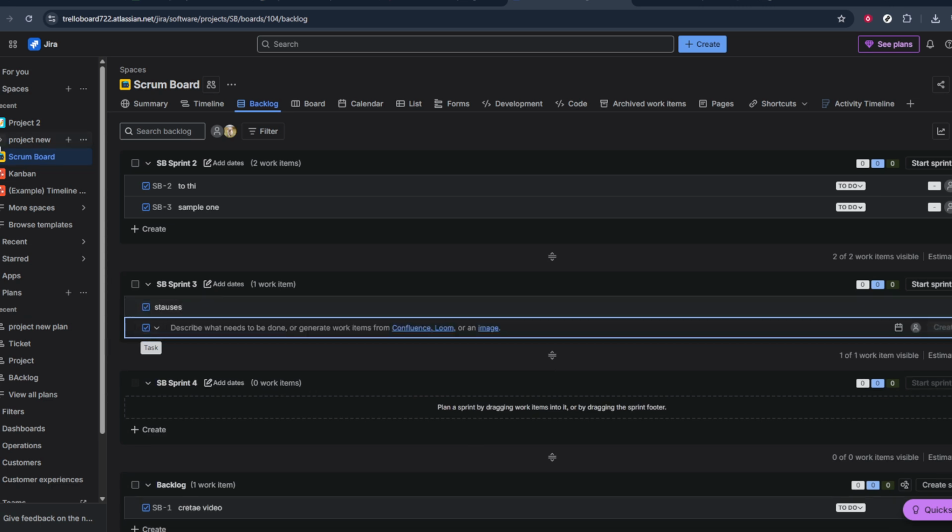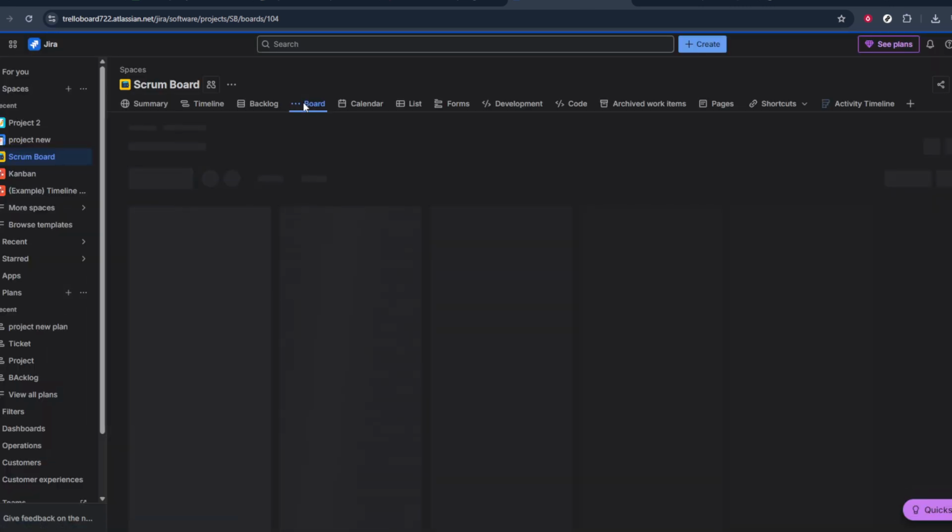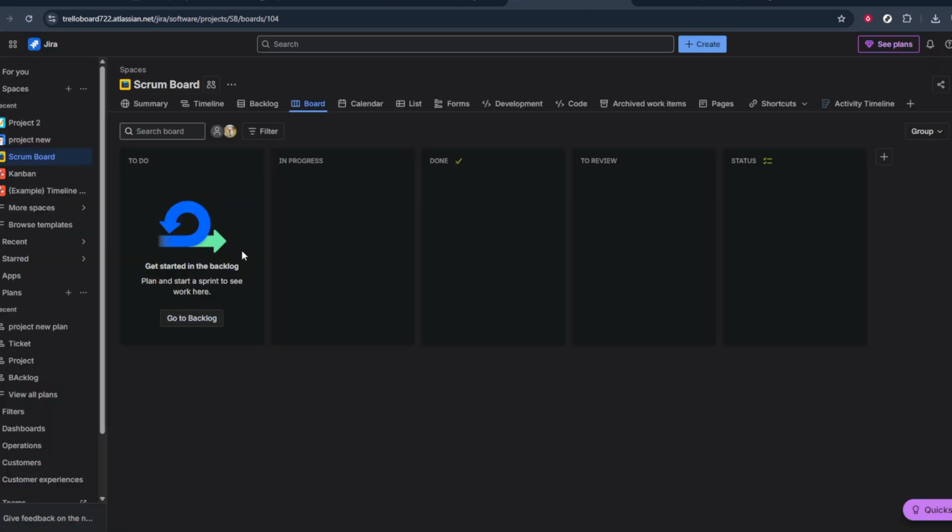When you add a new status, give it a clear descriptive name so your team immediately understands when to use it. You may also be able to choose a status category, such as to do, in progress, or done. Picking the right category affects how JIRA treats that status in reports and workflows, so align it with whether the work hasn't started yet, is ongoing, or is finished.